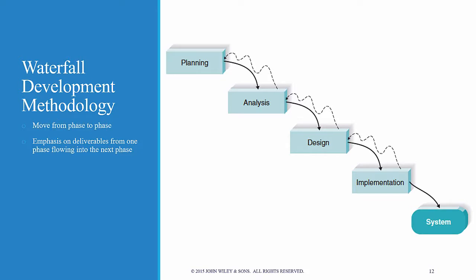The classic approach is the so-called waterfall development methodology. By looking at the chart here, you can probably figure out why it's called waterfall. You move from planning to analysis to design and implementation in a lockstep, waterfall fashion. That is, you complete all of the steps and tasks and provide the deliverables for the prior phase before you cascade down to the next phase, going through all four phases, and then you have the system.